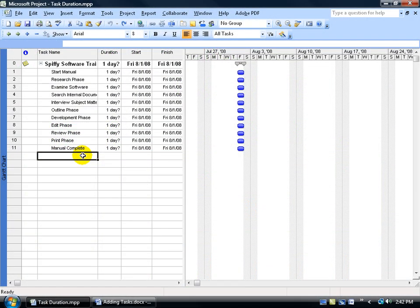As we've already seen, when it comes to creating a new task, by default Microsoft is going to give the task the duration of one day. Why the question mark? It's an indicator to let you know that you didn't enter in the duration, but Microsoft did, so you're not confused. The moment you come in and decide to change the day, it'll actually get rid of the question mark.